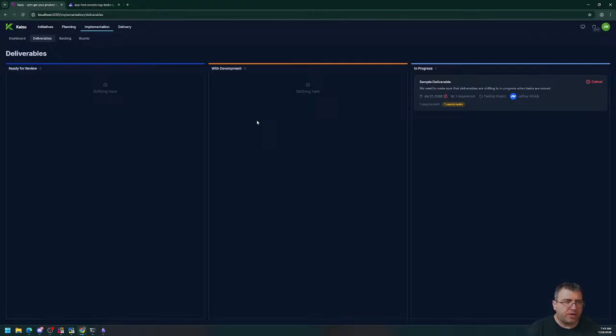I can then know it's ready for review. Ready for review means, hey, I can go and read that. I can look through the requirements. I can ask questions. I can dig in a little bit more. I might be able to do some research on some stuff to be ready for planning. And then at the point where they're comfortable, the PM would call a planning meeting to review that thing, and the team will go through it and decide, oh yeah, we can test it out. And once they're comfortable, the PM can mark it as with development. Right? So it moves to this. So we know that this is something that we can actually work on, and discuss properly.